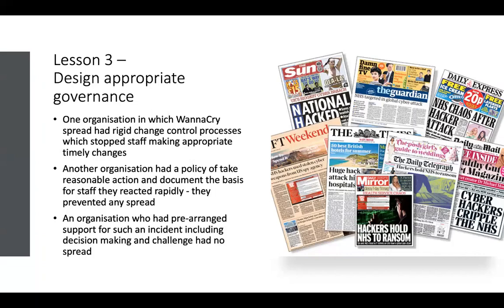Another one was some really good practice that we saw about an organization who had done some real planning about this and said, well, what if something bad happens in the cyber world or in the infrastructure world? And they had pre-arranged what they would do with various third-party suppliers, including cybersecurity companies, and had a pre-agreed protocol to actually call on them.